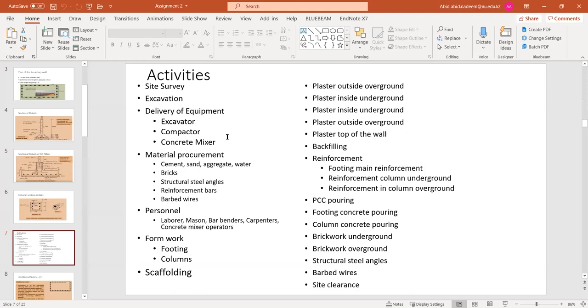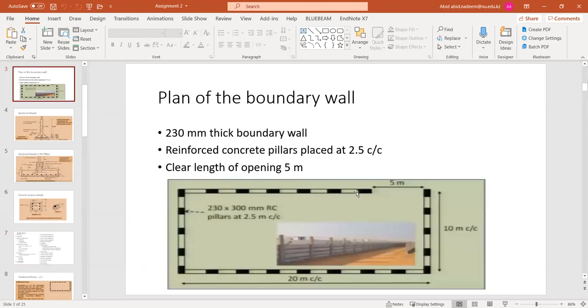For that purpose, this geotechnical report is very important in deciding whether for the excavation we will need to provide lateral supports or not. Okay. So excavation will be performed. For safety, maybe you can assume that the whole excavation activity will take like 2 days.